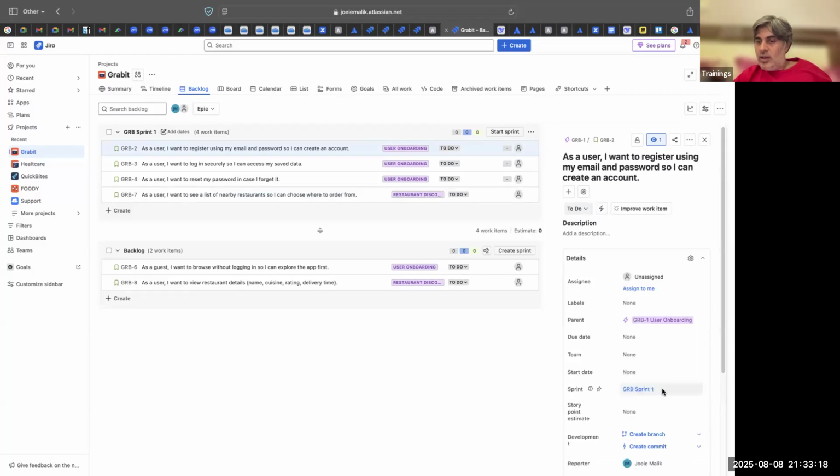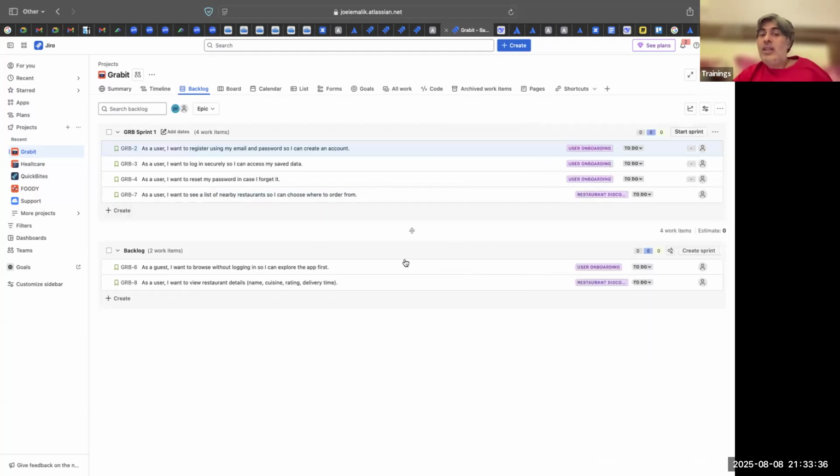So you can click here and choose the option of whichever sprint you are going to be picking. Either you do a drag and drop, or you can manually assign the sprint value to that story. PO cannot assign this story. Scrum Master should not assign this story. This story should be picked by the developer himself or herself. They should be allowed the freedom to have this discussion and then decide who will do which story. Is this clear? So this is what happens in the sprint planning.